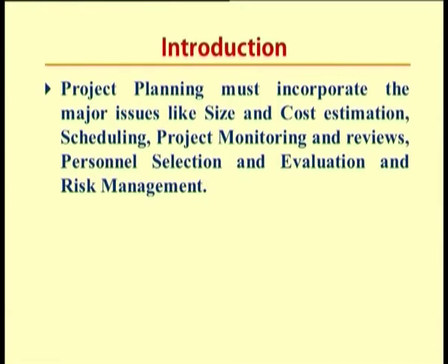Based on the size we can estimate the cost and schedule, the rough time, and project monitoring, that is, when and what are the aspects which are to be monitored, and reviews, who are the set of persons who will be selected for such a kind of work. So by personnel selection I will be going for effort estimation. Effort is generally measured in terms of person months, and then evaluation and risk management.